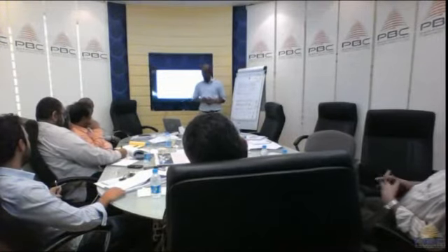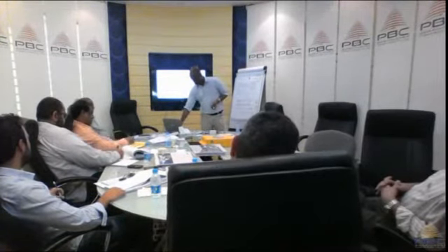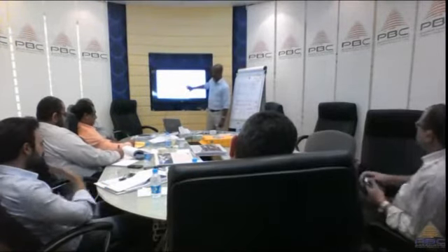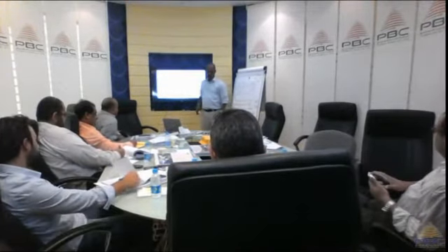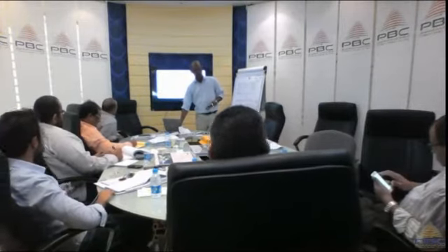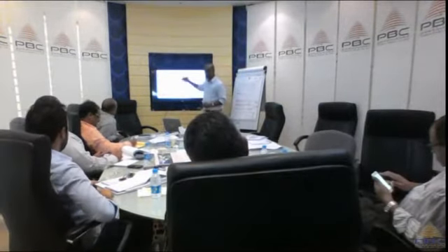This is what we do. The CV is the difference between your EV and AC, which gives you your cost variance here. So visually, the project officer or whoever is responsible can get a lot of data out of this simple technique called earned value management.